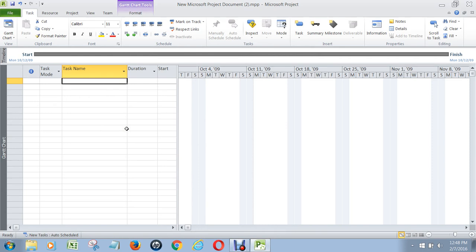So here in video 2, what we're going to do is start with a project that involves overhauling and testing two machines, and then running them side-by-side to make sure they feed product to each other successfully. You start off simply by typing in every heading you want to use in your project — every task, every milestone — all to be explained in a minute.